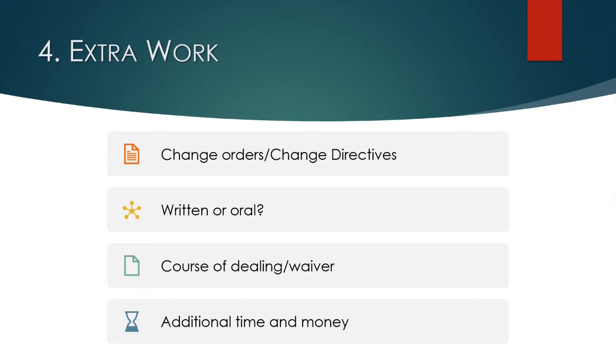It doesn't make that much of a difference if we're talking about one or two small change orders, but in projects that we've been involved in where there was a course of dealing where change orders were not being signed, or the provisions were not being followed, the claim ends up being a very large one.